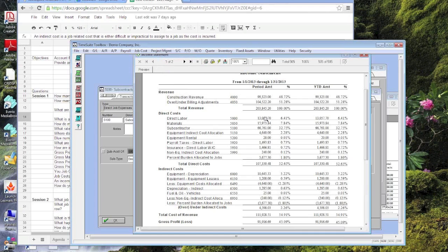So it's very in-depth. We have probably 5 to 10% of our customer base that uses that to burden their jobs on a regular basis. Maybe half of our customer base will use that burden utility grid to retroactively true up the indirect costs, maybe to the beginning of the month or beginning of a quarter or beginning of the fiscal year, so that your over-under allocation goes to 0. And some people don't do that. But anyway, your indirect costs, your job cost in the system, will tie in here to your 107,330.